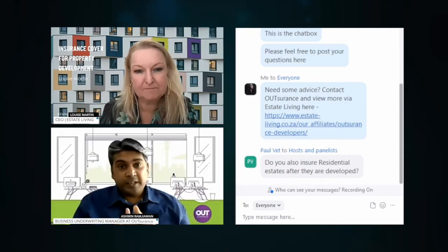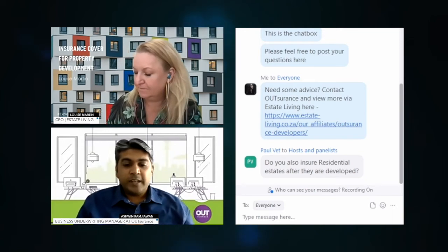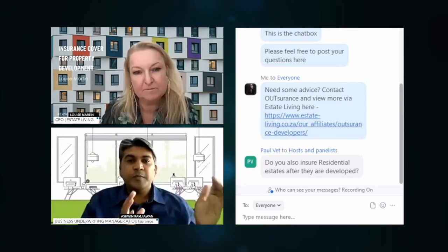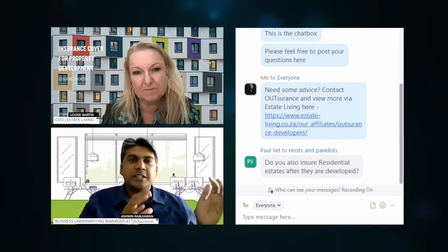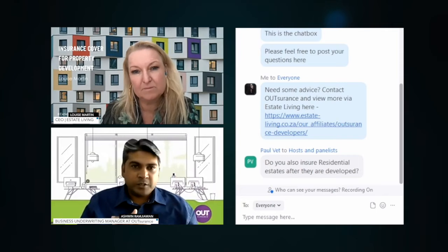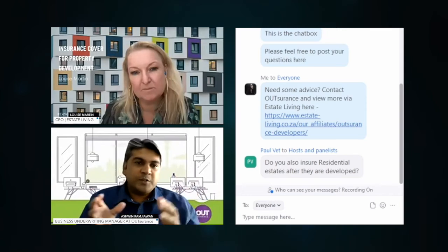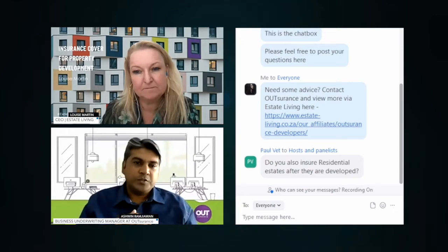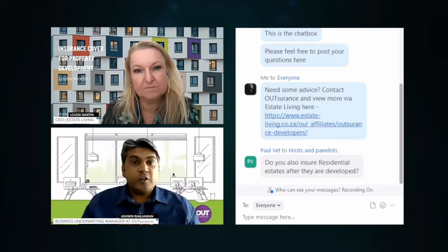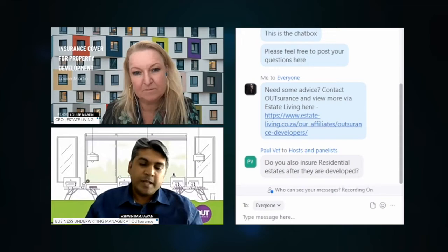You get a testing period as well in terms of contractors all risk. That testing period is when you need to commission something or test something. So if the contractor is installing some plant and machinery in a light industrial building, there's a period where that contractor has to test and commission and make sure that the plant and machinery is functioning and working optimally, and there's no issue. So that particular contractor can also opt for the testing period, which is one of the options on the product.